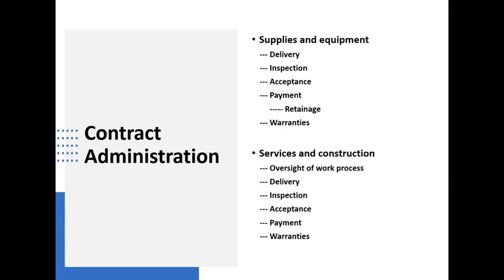Because those particular steps lead to the question of whether you have accepted delivery and whether you are liable for paying for that. Now, the assumption as well is that payment may involve holding back a certain amount of the final payment until full delivery and acceptance has occurred. So you might be dealing with partial decisions on some of this stuff as well.